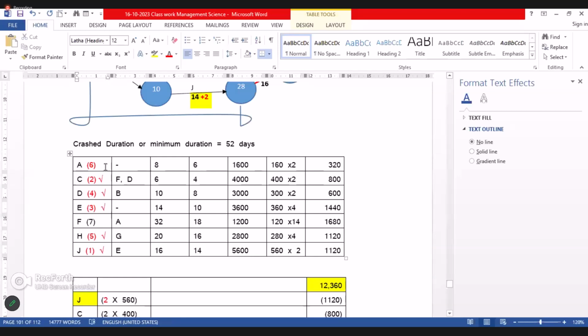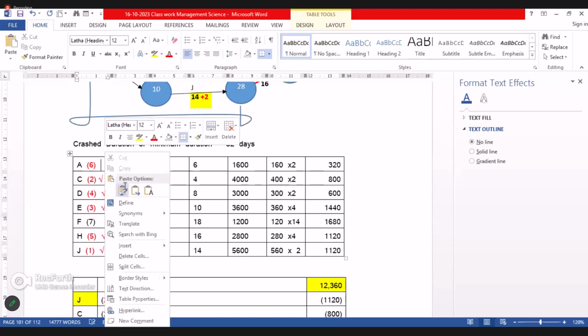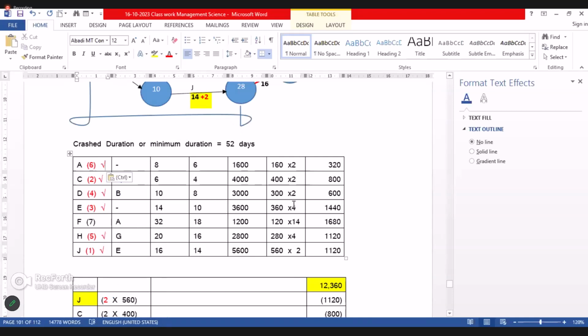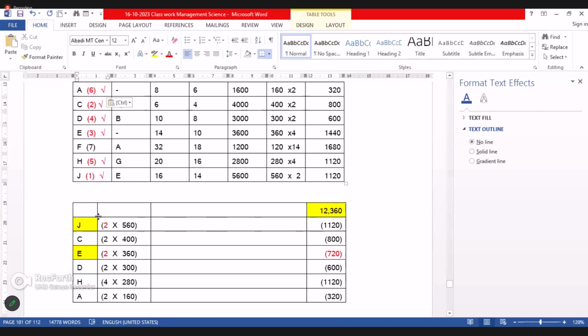See that we are doing it in incremental order. First the highest slope, then next. If you do A first, sometimes we cannot make adjustments in the higher slope activities. That is the reason for prioritizing, right? So the last one is F.